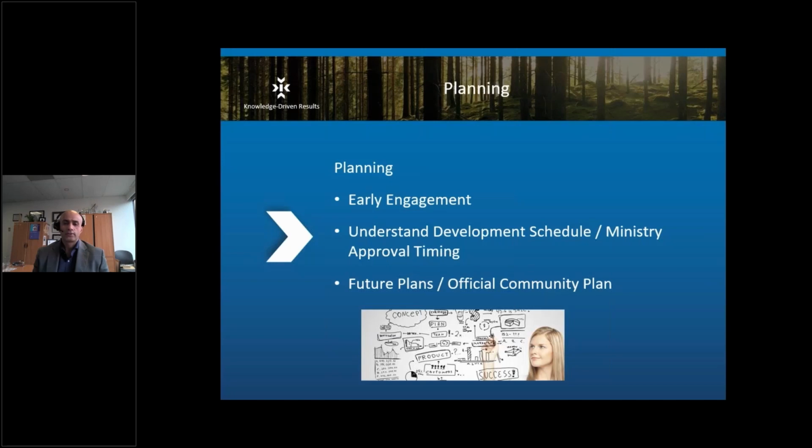The other thing to consider is if you need P6 approvals, when should you start that? So our recommendation is understanding what the steps are required from a contaminated sites point of view, understanding the development schedule and identifying your critical pathways, and working backwards to understand when you should start conducting your investigations, getting your P6 approvals, and when you should get your AIPs, and understanding that you will need the COC prior to occupancy.